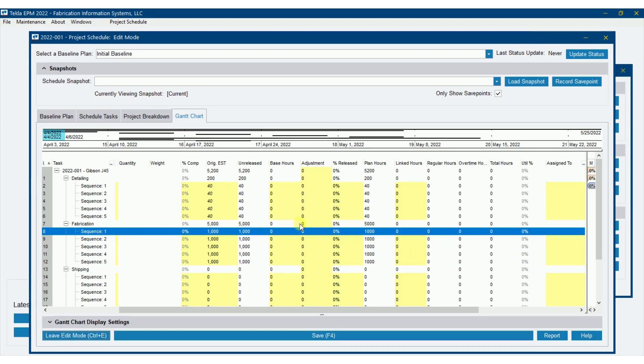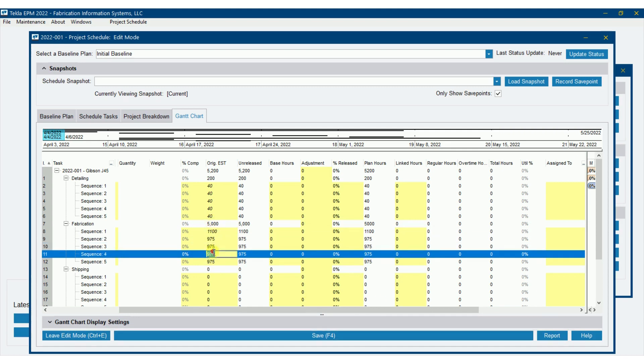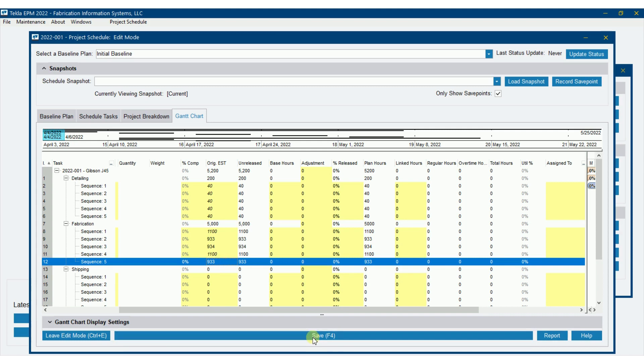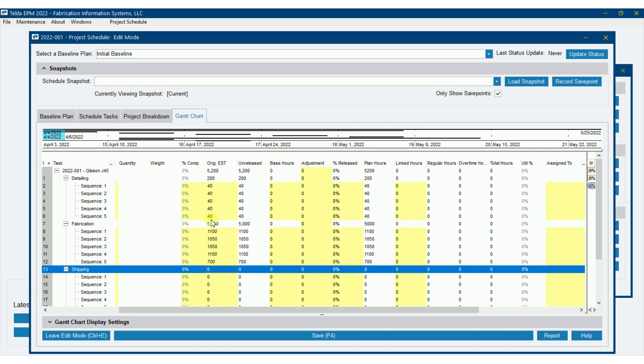But let's say that sequence one based off the work that's coming out, that's going to be 1,100 hours. You'll see that the rest of these adjust accordingly in order to equal that 5,000. Let's say that sequence four, that's going to be 1,100 hours as well. And let's say that sequence five is only going to be 700. So all those adjust accordingly in order to equal that 5,000 up there. So that could be a very effective way to do that. Or I could just walk down through there and plug in whatever I wanted.